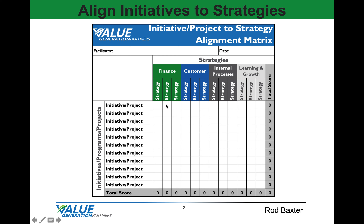The matrix will auto-calculate a total score for each initiative and project — that's the row — as well as a total score for each strategic objective. You can review the alignment matrix for strategic goals and objectives that do not have strong enough initiatives and projects to achieve success.